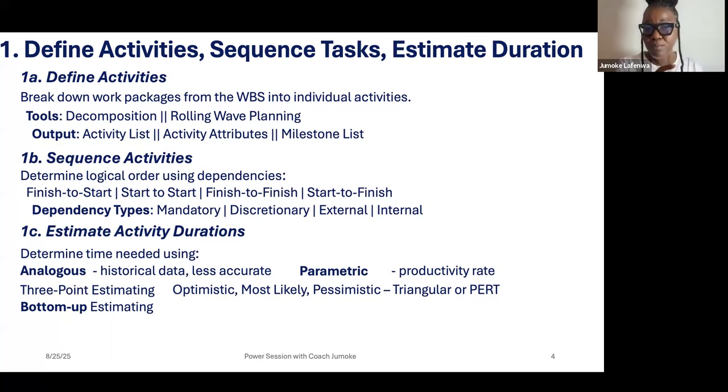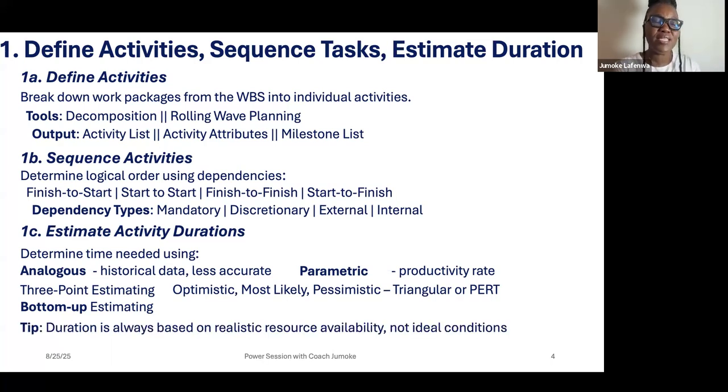And you cannot do the bottom-up estimating when you have not completed your WBS. All right, so I just included this tip. Duration is always based on realistic resource availability, not ideal conditions. So don't answer questions based on how it ideally should be, or how we do it in an organization. Look at the questions and see whether they are telling you a resource that is available.